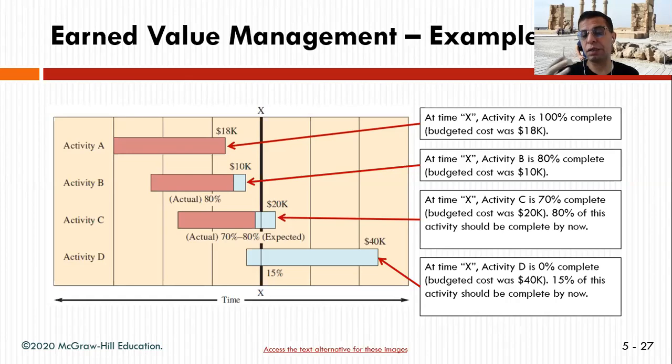And there is activity D, which you're supposed to start a little bit before the X time, which is the milestone time, and you have not started it. And that can also help you with the timing and the slack time, because if activity D is not important, not crucial to other activities, you can wait and focus on other activities to finish activity C and B, for example.